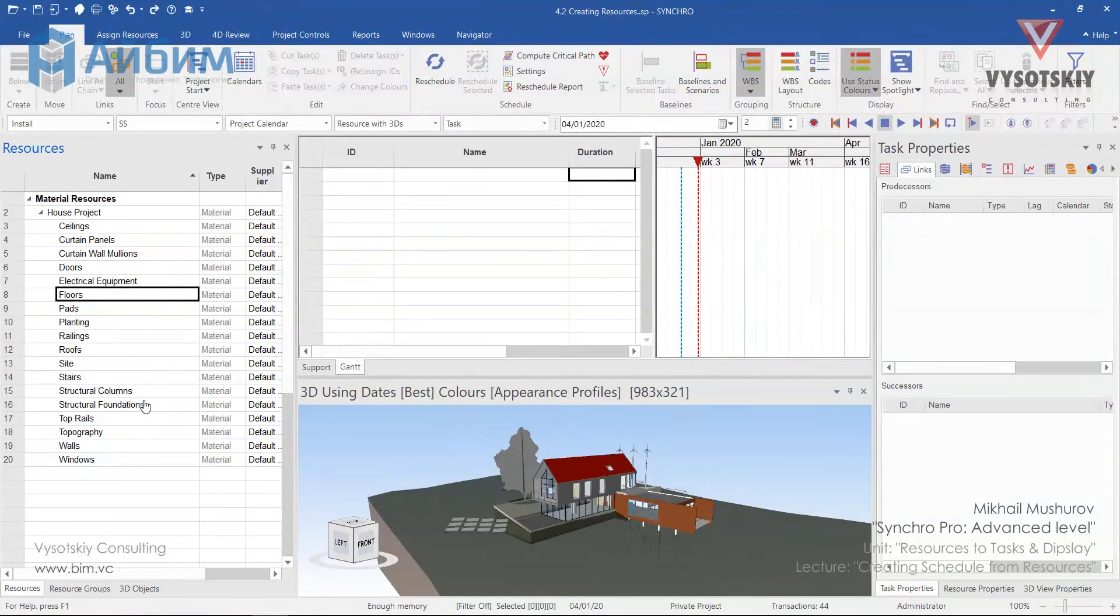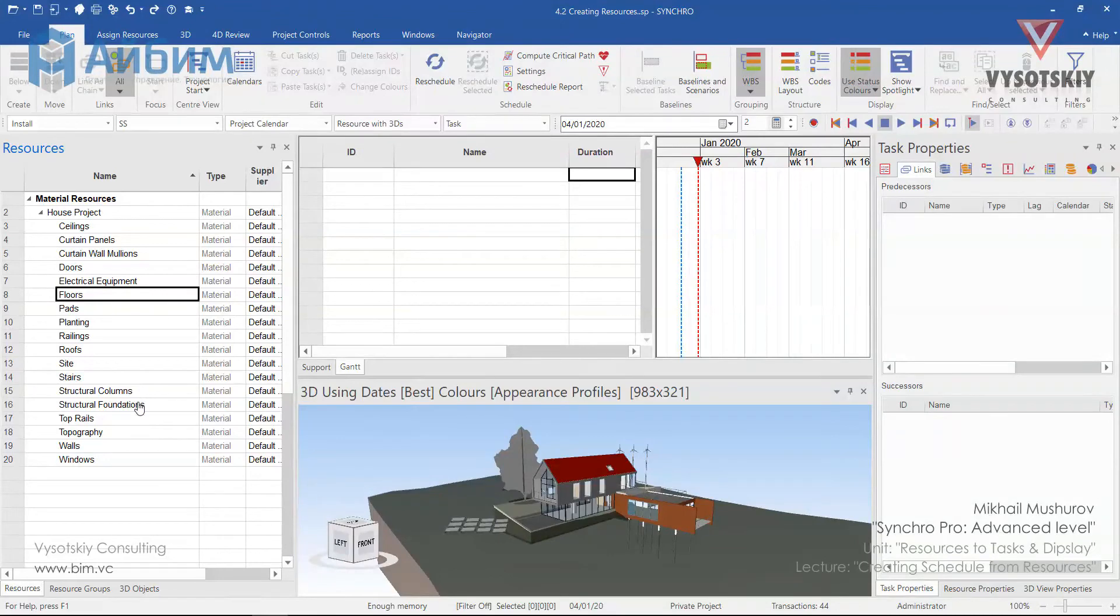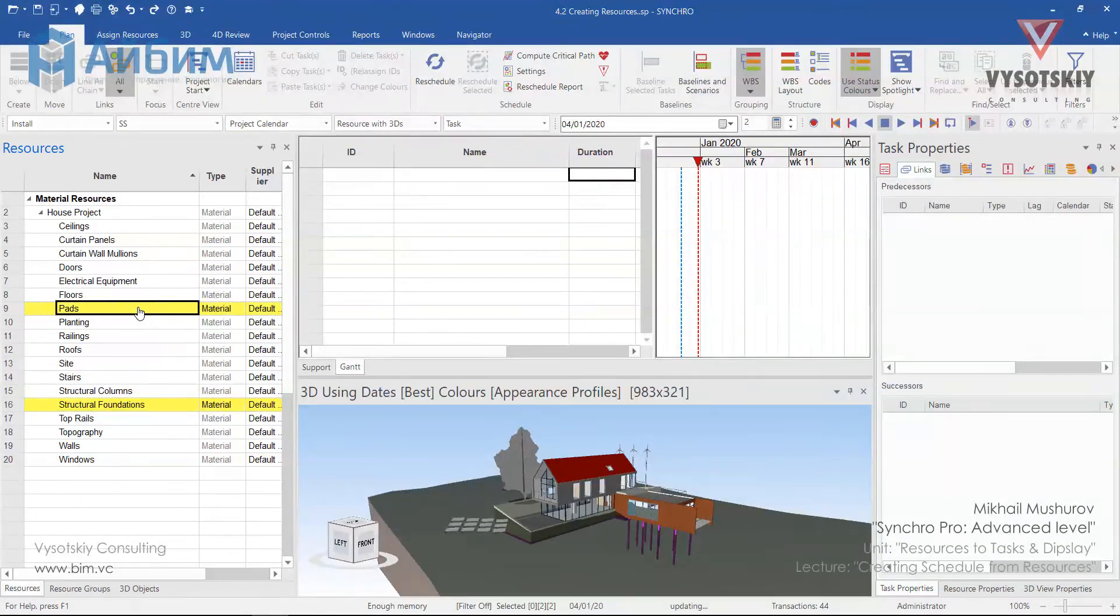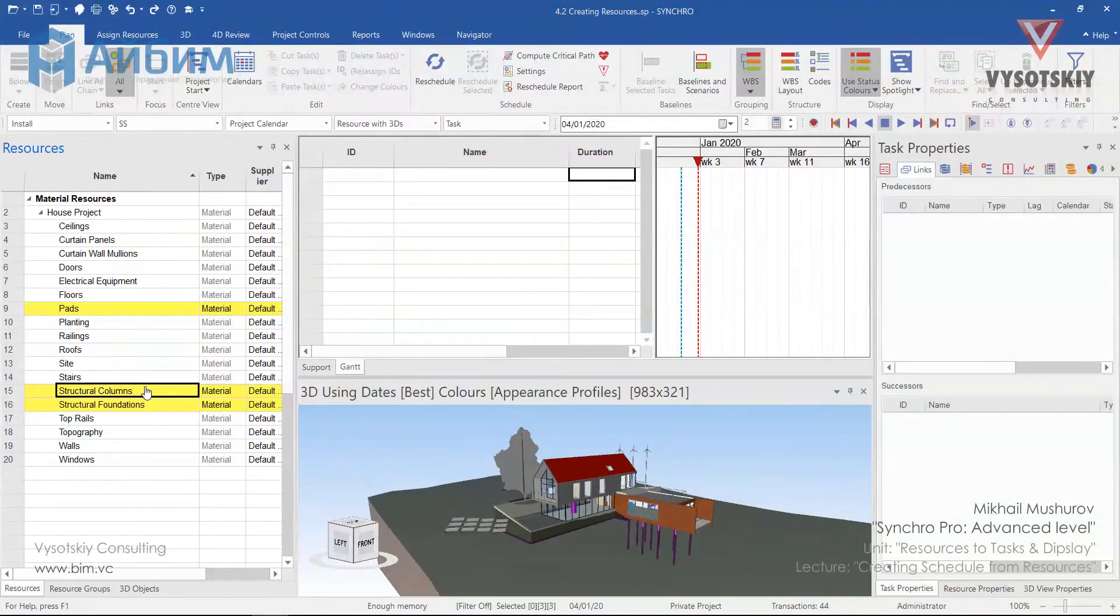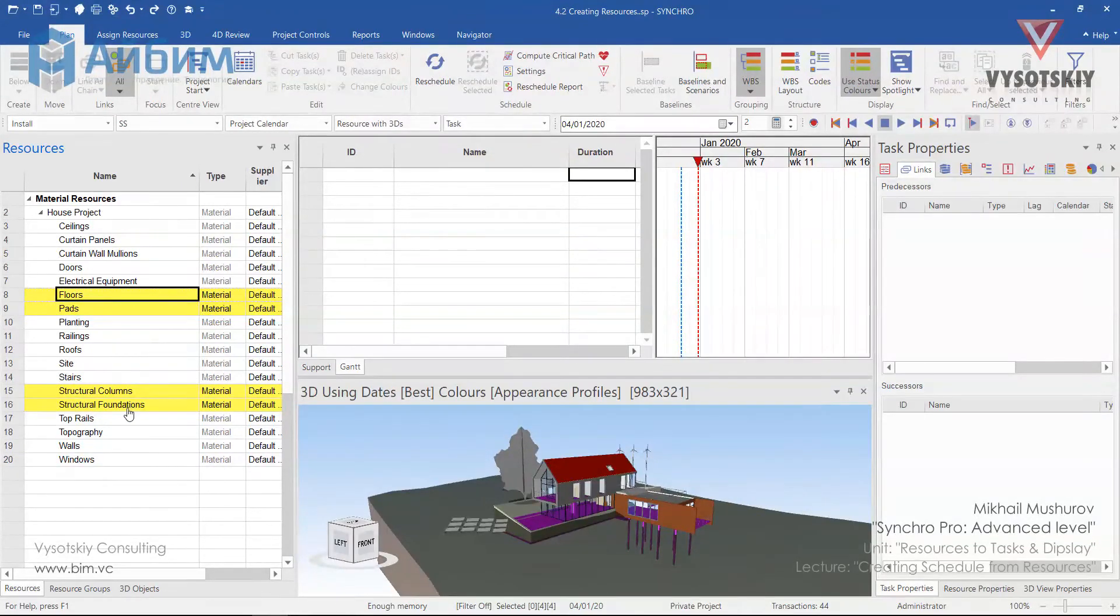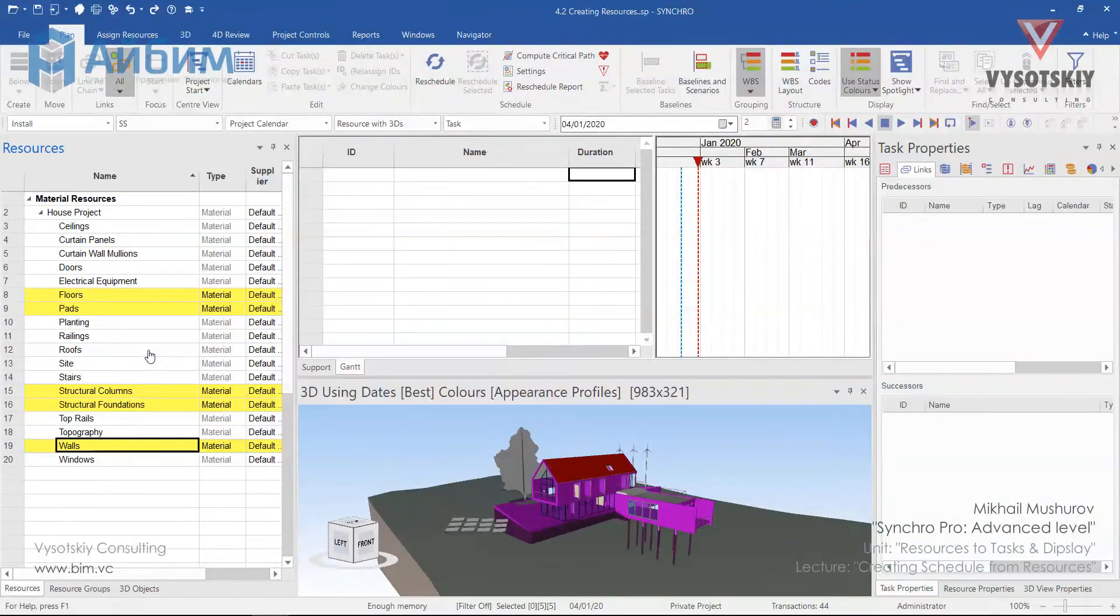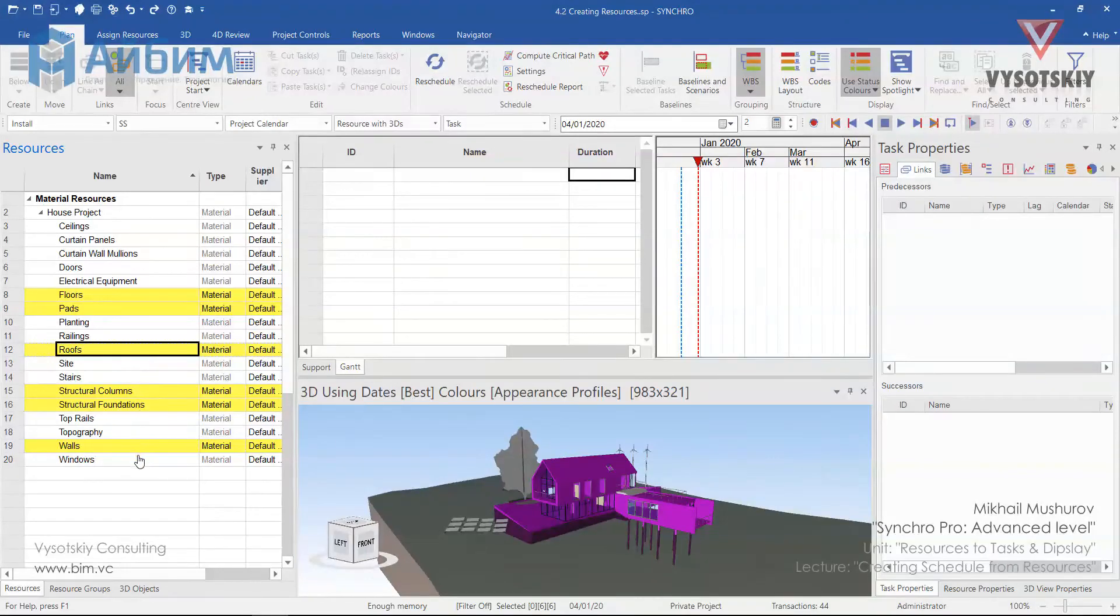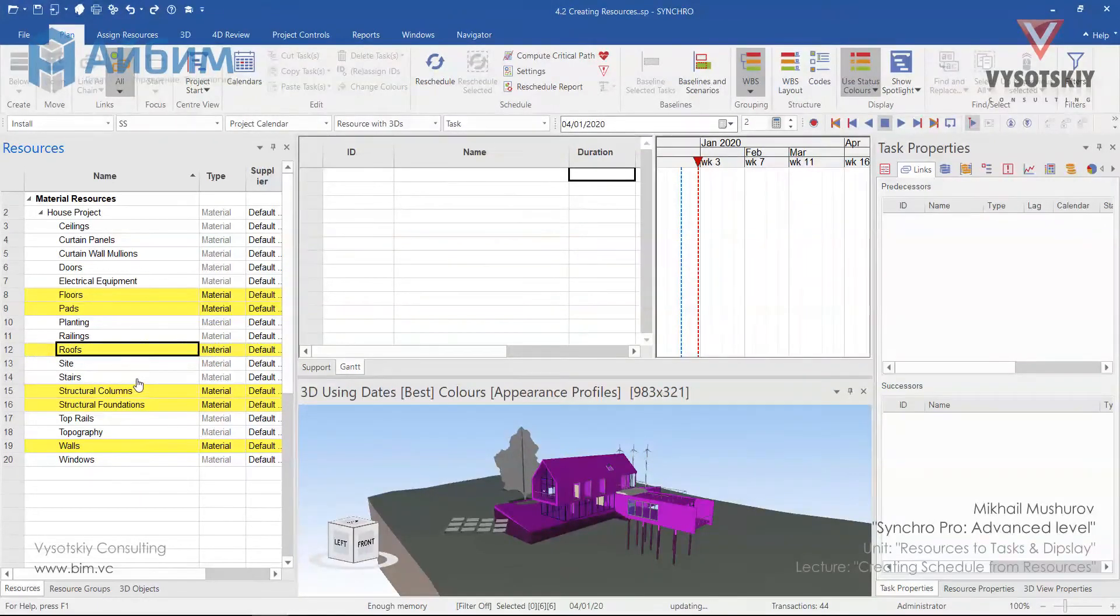Our order will be, first of all, we will cast structural foundations, then beds, then structural columns, floors, walls, roofs and lastly stairs.